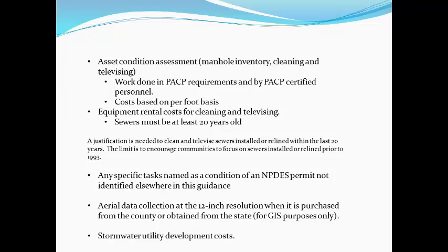Also, any specific tasks associated with an NPDES permit that might not be addressed in our guidance are allowable under our program. Stormwater utility development costs are also allowed. We will pay for development of user charge systems, service agreements, ordinances. We will pay for those development costs, but we will not pay for the defense of those legal documents.